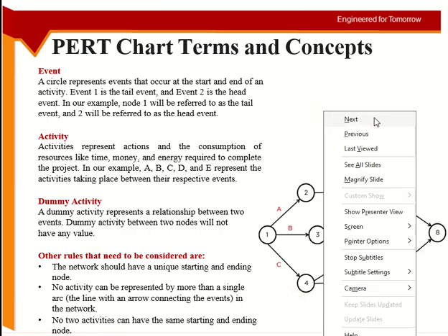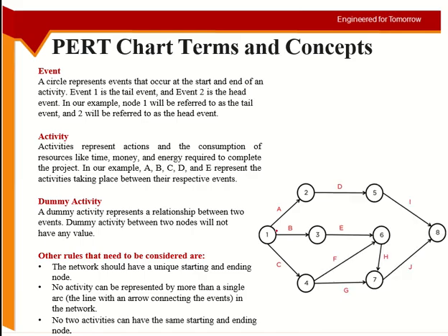I cannot have something like this: this is A, and I make another one starting from 1 and ending at 2, same as A, but I say no, it's not A, it's activity Z. This is wrong. This cannot happen. Activity Z is nothing, activity Z is A. You are just making your life difficult here.